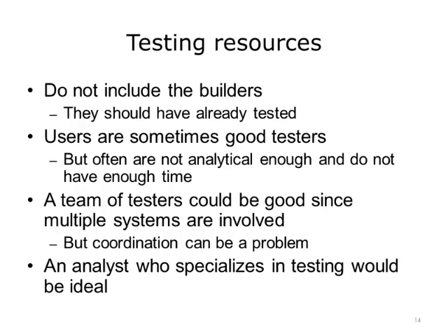When selecting testing resources, do not select people that did the building because they already think their stuff works. Users are often asked to test, but often they do not understand the systems in enough depth and are not able to dedicate the time and are not analytical enough. You could have a team of testers involving one expert from each system, but the coordination challenges can lead to inefficiencies. The best testing resources are analysts who specialize in testing, and they are called quality analysts.